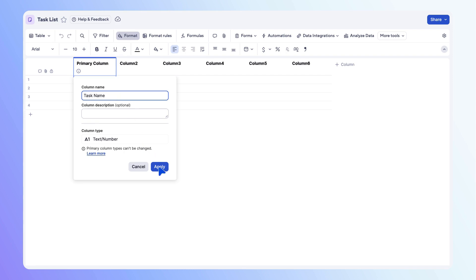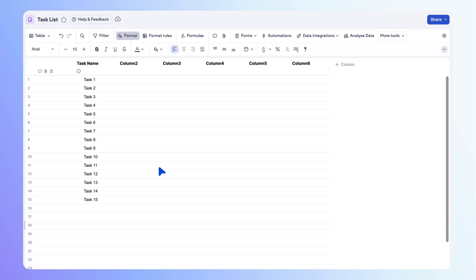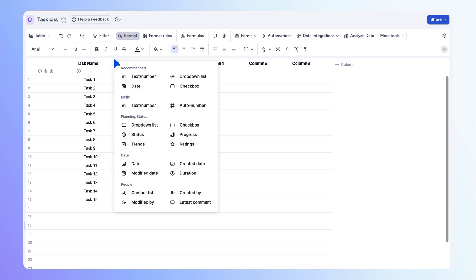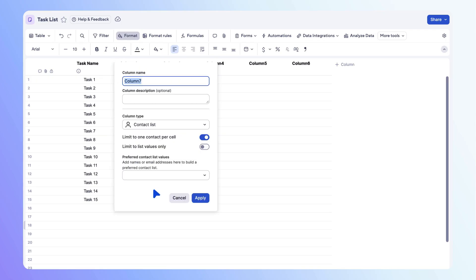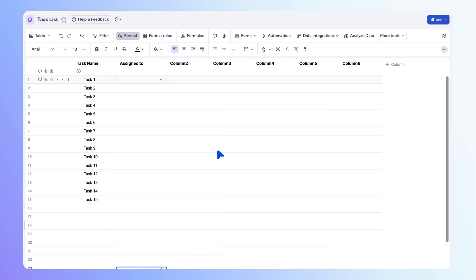Next, let's add a contact column so you can assign each task to a teammate. You can add columns by hovering your mouse between two columns, then select the add column shortcut. Select contact list, name the column assigned to, then adjust any settings as needed. Use the drop down menu to assign contact values. When you are done, select apply. In the cell, use the drop down arrow to add a contact value for the row. Repeat for each row.